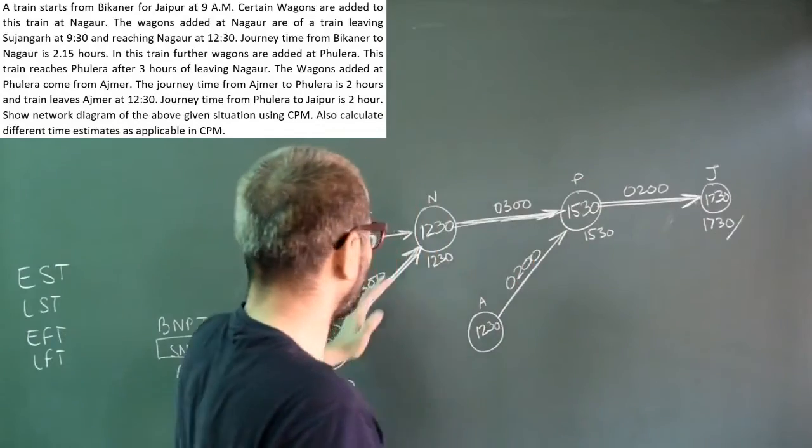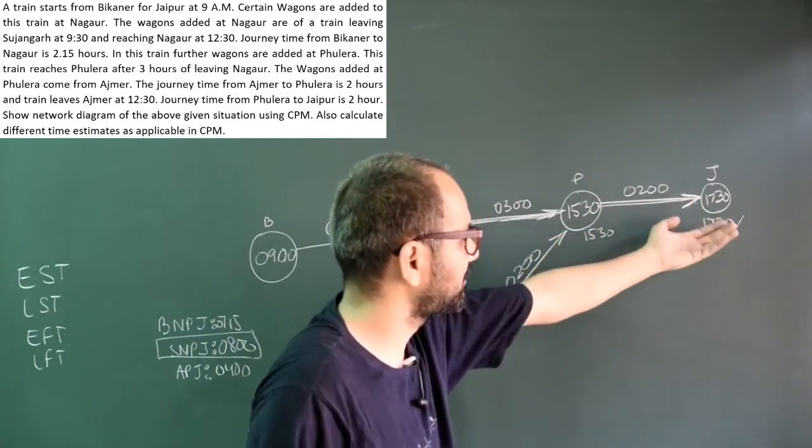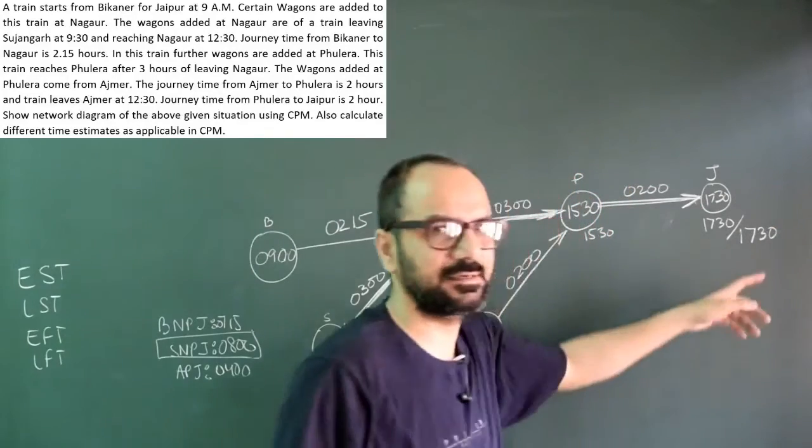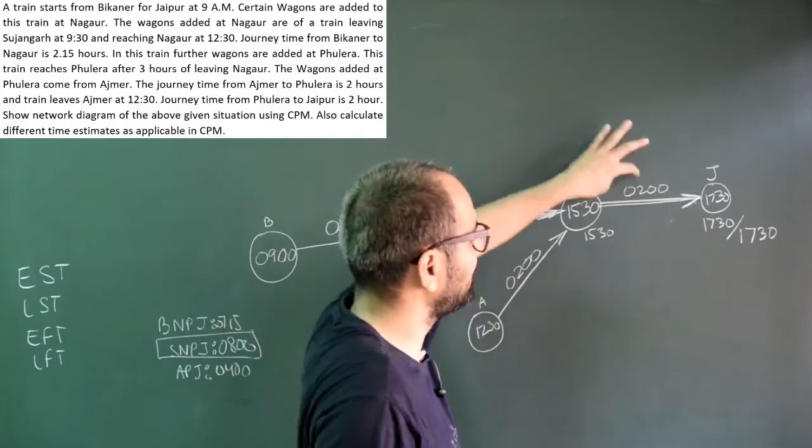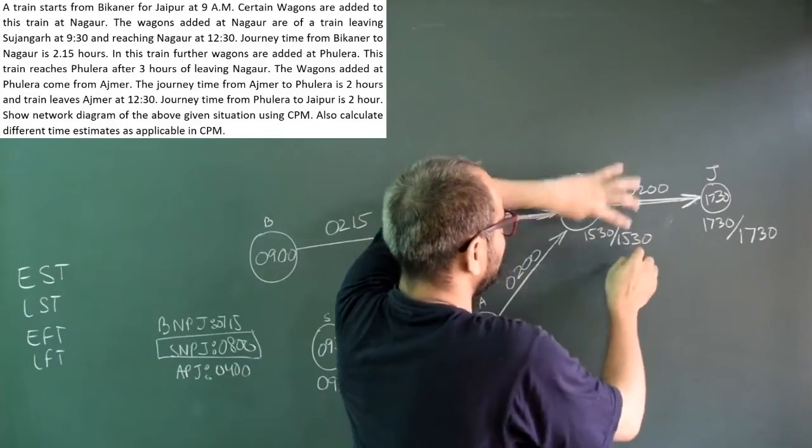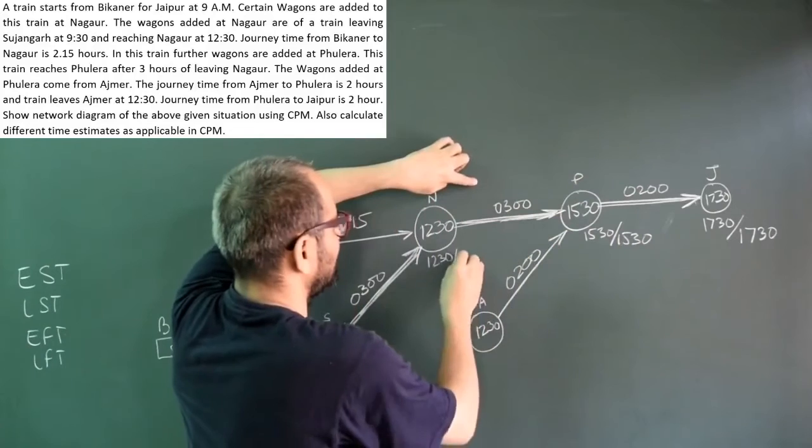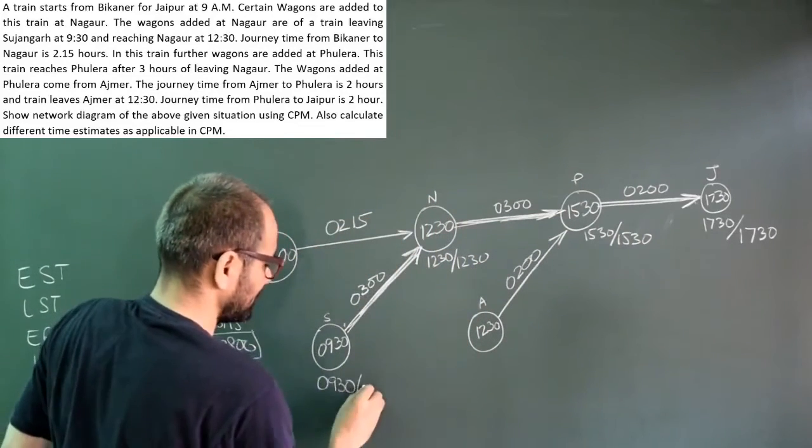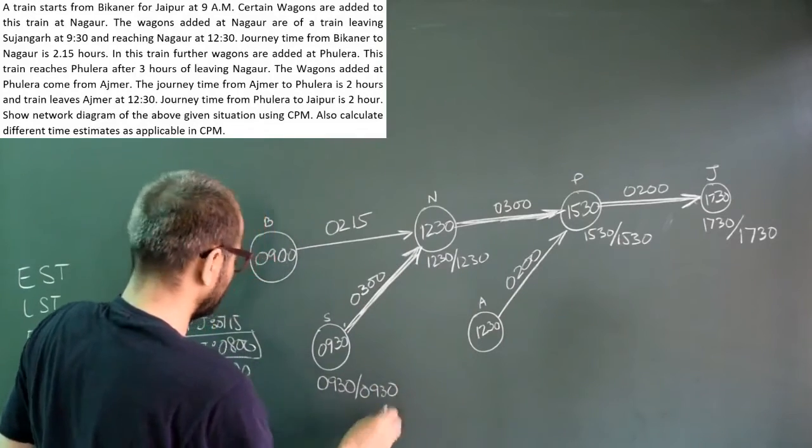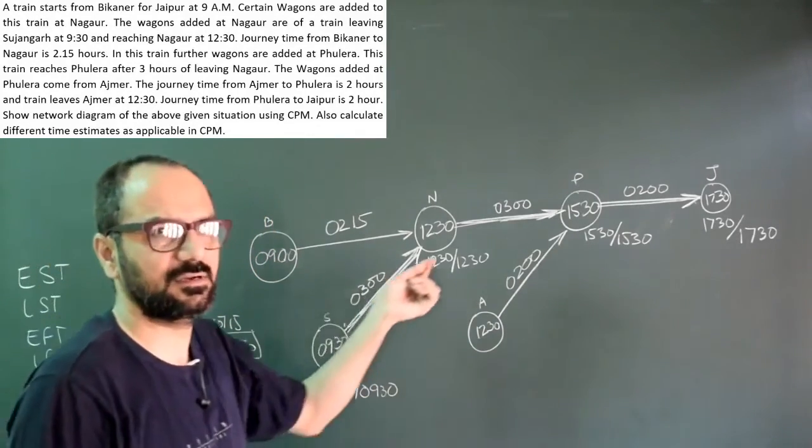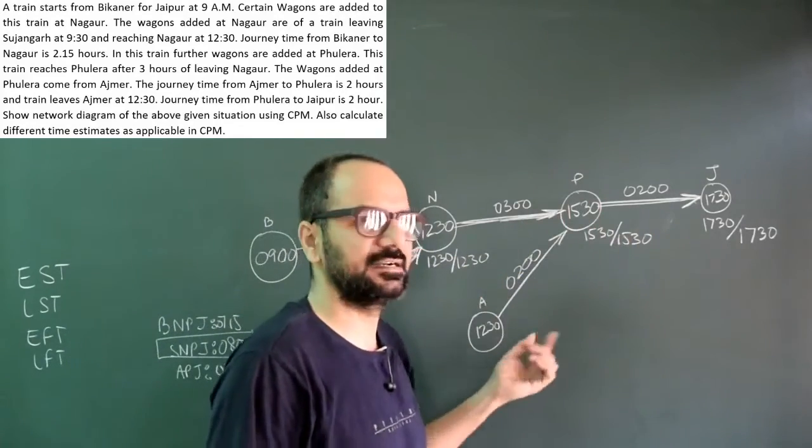Now let me start my backward pass. Being critical, it will still start with 17:30, minus 2 hours is 15:30, minus 3 hours is 12:30, minus 3 hours is 9:30. So as far as Sujanagad to Jaipur is concerned, there are no leverages. These are earliest and latest scheduled times.